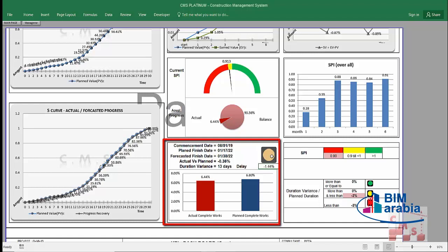Also here, there is an indication, either green or yellow or red. Also, you have to insert for CMS what is the value which will give you a red alarm. Also, you have to consider the maximum penalties and preliminaries which can be accrued or consumed, and at the same time will keep you within budget. What is the amount of the contingency you already keep for these cases, to keep you within budget? This is very important. According to this amount and your company policy, you will put this percentage. By default, CMS will consider it here as minus 5%.